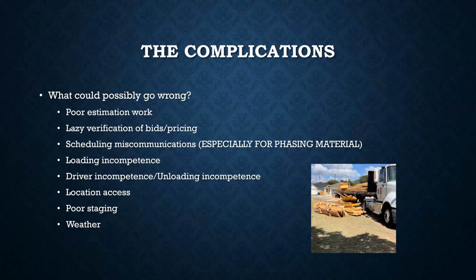Then what might happen is, oh yeah, the floor joists are going to take an extra week to arrive. That might matter for this 3-story house: they were done with the first floor in a day because it was like 5 walls, and then they needed the floor joists and they weren't ready. So these things can have an impact.